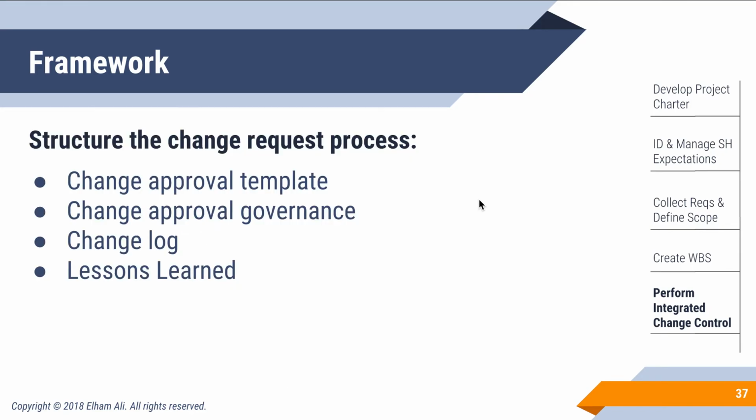So our framework is that when you're thinking of scope creep, one of the things we're going to tackle is the lack of effective change management. You want to have an effective process in hand, and that requires your change approval governance. In the beginning, we talked about your context diagram and how it provides you with an idea of project governance and project structure. So this will also give you an idea of your change approval and who's part of this board that will approve things.